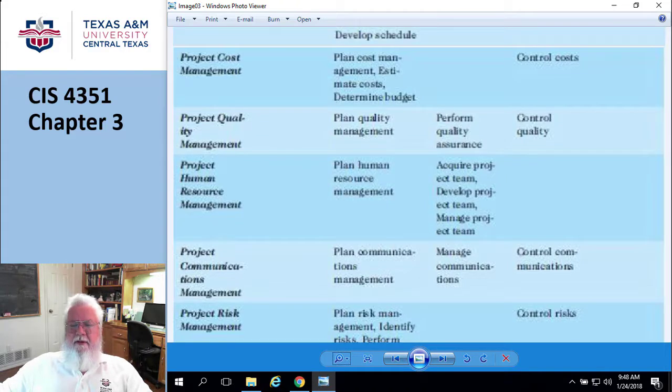So you might want to use Prince or RUP, one of those kinds of guys. If, on the other hand, the quality of the product is so important, this is going to be your halo product that you're making for your organization. It's going to have every feature humanly imaginable, and it's going to be the super duper thing. You may not be selling an awful lot of them, but it's going to be the top of the line, whatever it is you're building. Well, then maybe you want to go Agile because you really want the wow factor. It doesn't matter how long it takes. I mean, if you said it was going to take 6 months and ended up taking a year, that's okay. So see the kind of thinking?